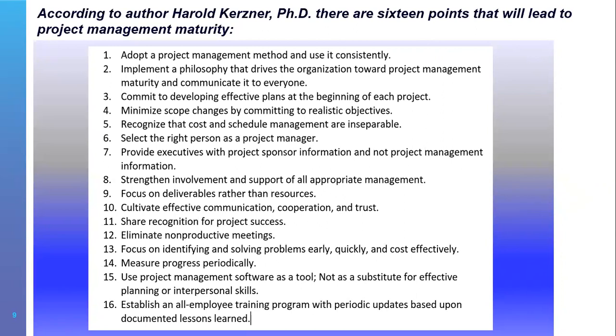The statement of work, or however you call your contract document, let's call it statement of work because it's how we call it in our methodology. The statement of work as a project manager has to be your Bible. You need to know everything, every term that is in the statement of work, and you need to make sure that first of all you deliver everything, like I said before, but on the other hand, that everything outside of what is stated in the statement of work needs to be a change request.